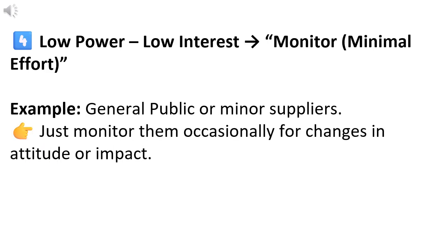4. Low power, low interest: monitor, minimal effort. They neither influence the project nor are deeply affected. Example: general public or minor suppliers. Just monitor them occasionally for changes in attitude or impact.